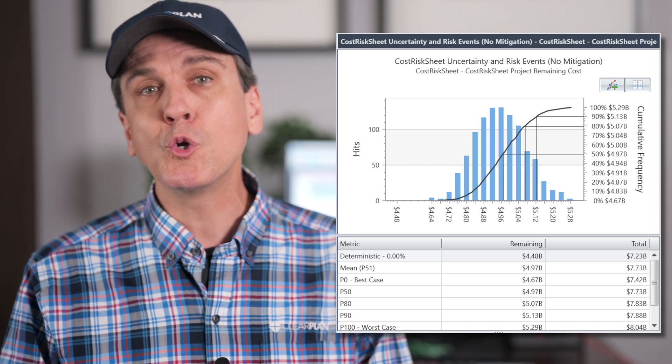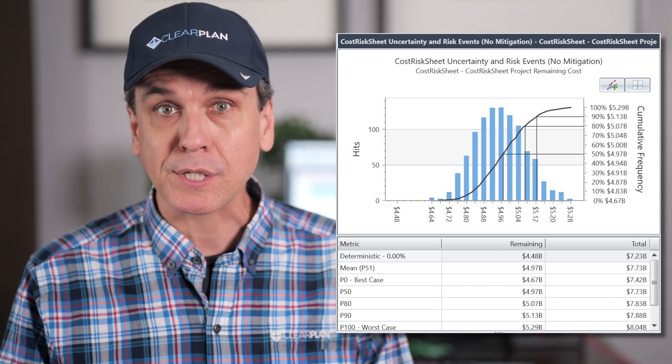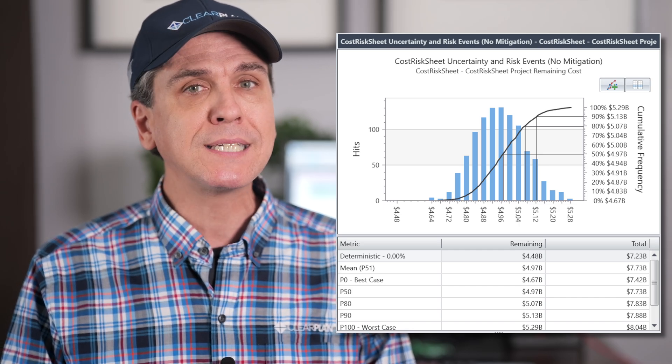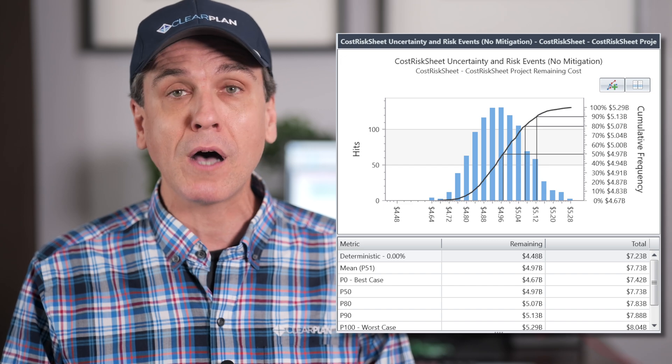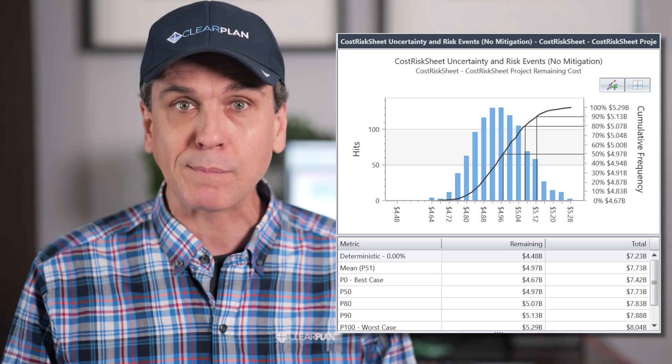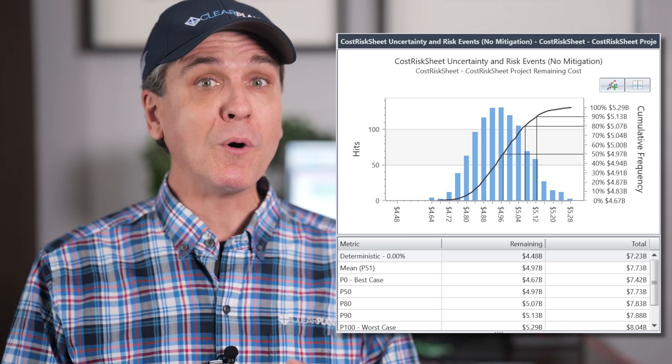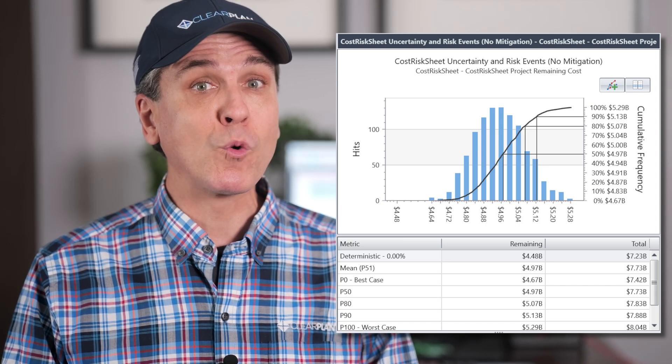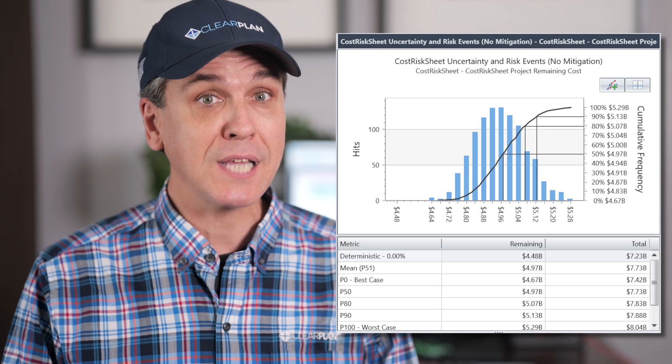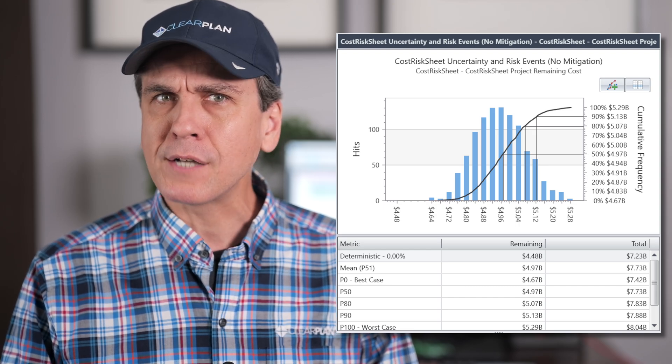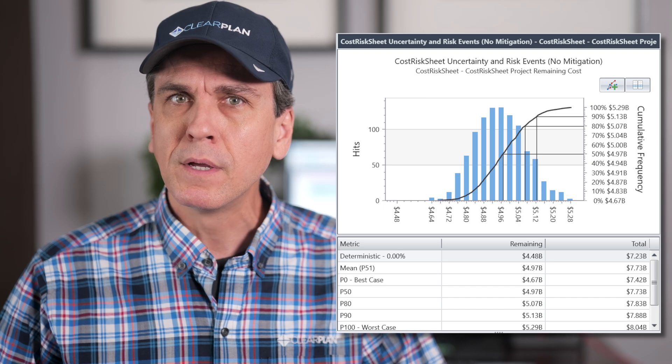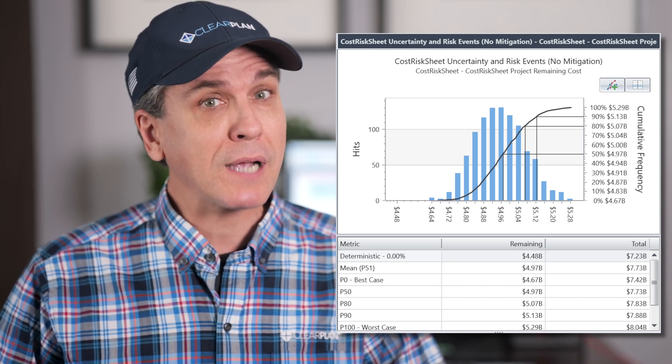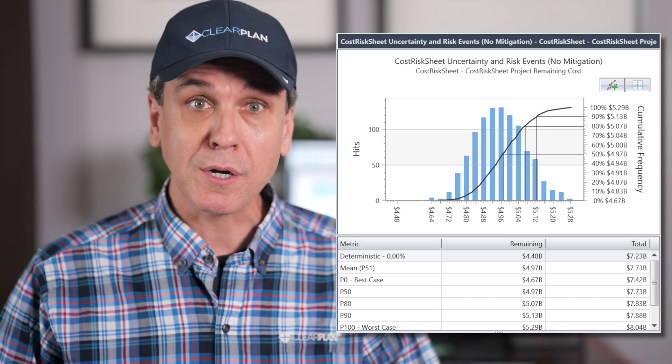If you are doing both a schedule and cost risk assessment, it's a good idea to take a look at both the schedule and cost risk exposure histograms with respect to one another. For example, if the P80 date for the schedule suggests significant delay, but P80 cost is spot on with the original cost estimate, you may still expect to overspend based on schedule delays alone.